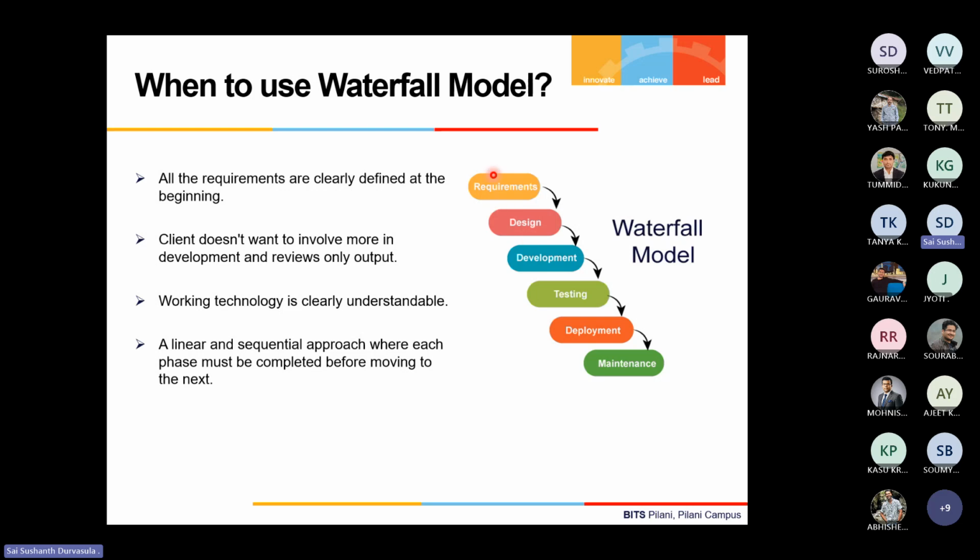Let's talk about the worst thing that could happen in this model: the client itself comes back after, let's say, 2 months of the process and says, along with divide, we also want to have a modulo feature. That was never planned in the first place, never designed, never developed, and so on. Which means we have to go back all the way to here and then pour water.